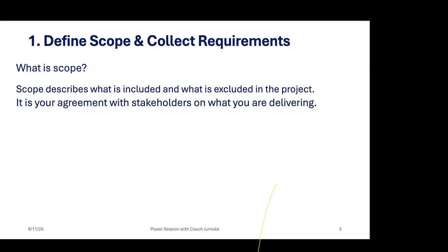Verify scope is before execution, whilst validating scope is after execution. So you have finished, completed your work, and that's when they check, okay, this was what we asked you to do. Yeah, it's done. What I just did now is validating scope.